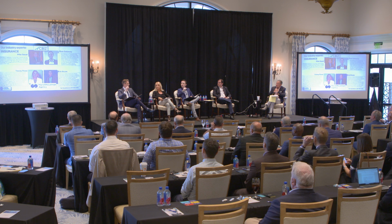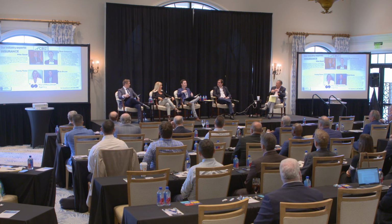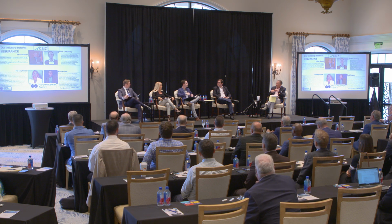But if we throw out there that, hey, your valuations due to get a quote with a carrier also have to go up 30%, so we're looking at a 70% increase after factoring in rate, that is so hard to digest. Interesting. And that point really is excellent, because some policies have limitations in your coverage if you are underinsured. But even if you've gotten an agreed amount policy that doesn't have that, you've only insured for $16 million and it costs $24 million to actually rebuild, you still were sublimited by $8 million in that situation.